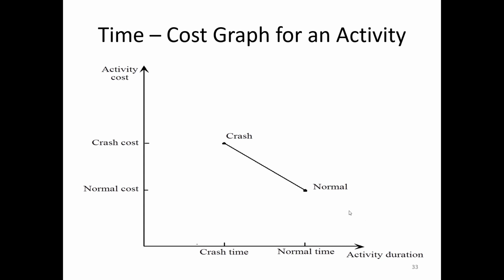We've represented it as somewhat linear. Over the short term, that's not too bad a representation. One could make the argument that it's non-linear, but sometimes that introduces a whole bunch of really complicating calculations because of nonlinearity that aren't worth it. So you can see it's represented as linear. Theoretically, you could make the argument that it's not. Like equipment depreciation, it's probably non-linear, but given the time frames we're talking about, given the ease of calculation, it's probably not worth it to introduce a non-linearity complication to the problem.